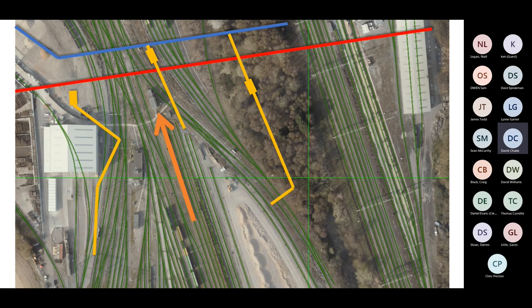There isn't much room on a railway, so this now means we need to go under the track at silly angles. We haven't quite got sign off for this yet, but there isn't really another option. But the problem is that, again, we can't cut and cover. We've got running sand. The only way that we can deal with it is by taking the track off. And we really don't like taking the track off, because if you walk down Basford Hall independent lines at any point, you'll realise how poor quality the track actually is because the drainage is shot. Because of that, every time we touch the track, we find a million faults that we then have to correct.